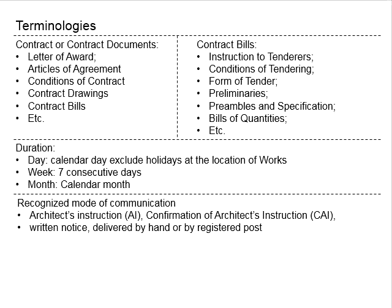As for other social media tools such as WhatsApp, WeChat, Instagram, and others — so far these are considered informal for giving instructions, and must be followed up with a proper written notice handed over to the recipient. In the context of the contract, all verbal communications are not quite valid, as there could be ambiguity and difficulty proving their existence. Instructions must come from the architect, not from other people.